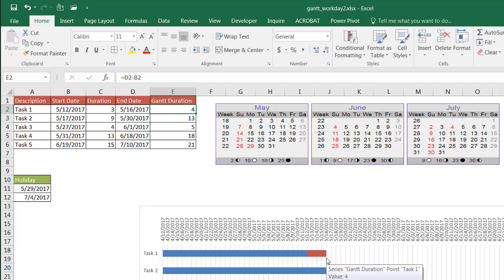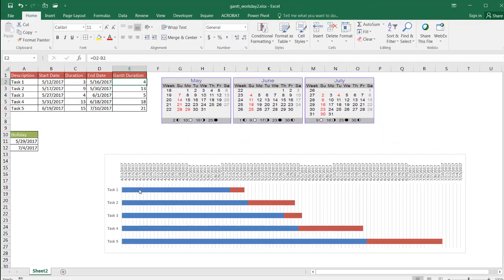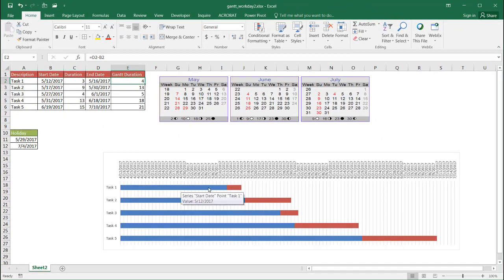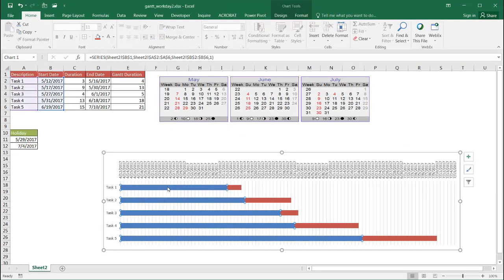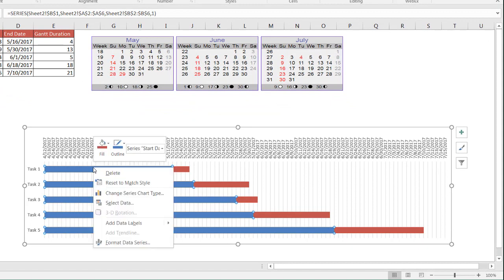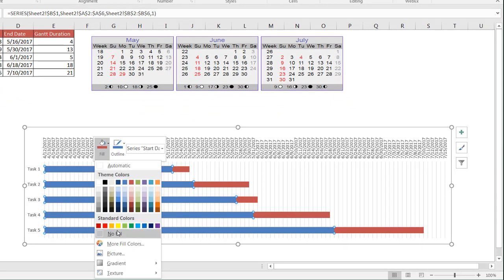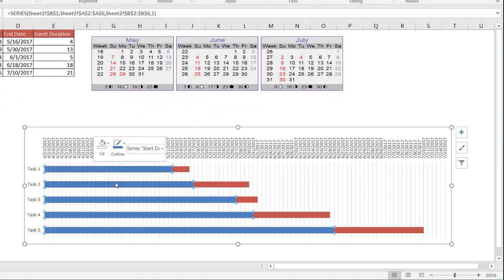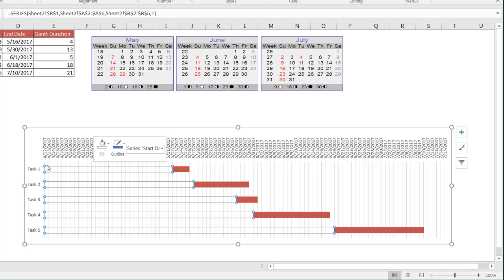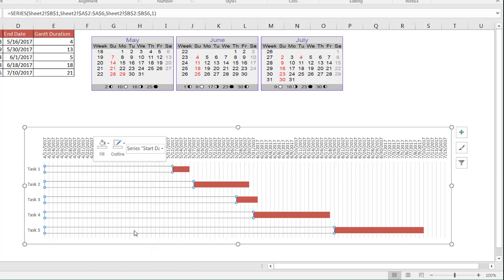So this Gantt duration is basically just a subtraction. We're subtracting the end date from the beginning date, and that gives us our Gantt duration of four days. And that's how it draws it out here. To make it complete, we really don't need this particular portion of the bar. Just click on that. You can see they're all selected now. Right click, and for the fill, we're going to make it no fill. And also we're going to get rid of the outline, so make it no outline.